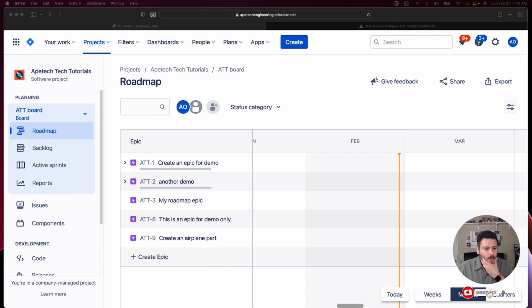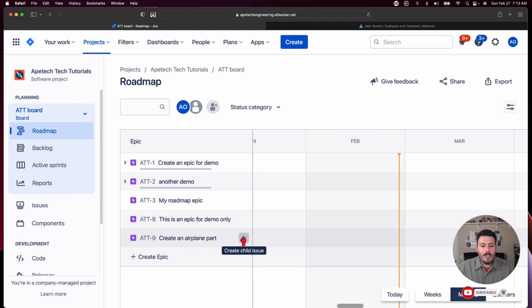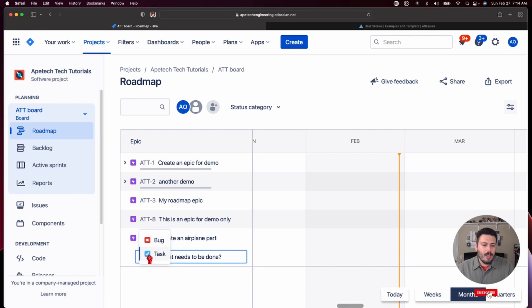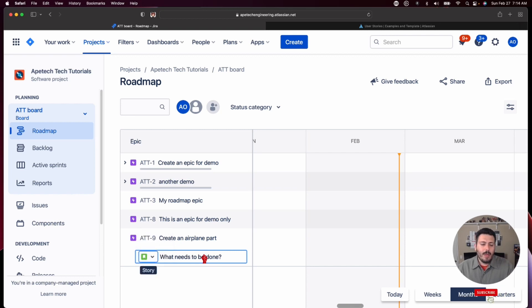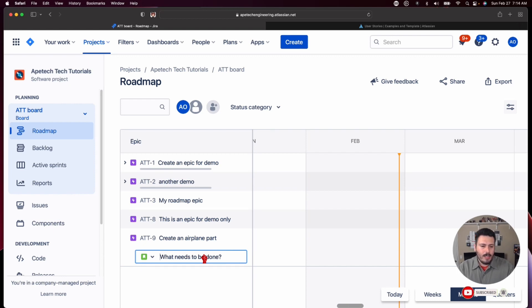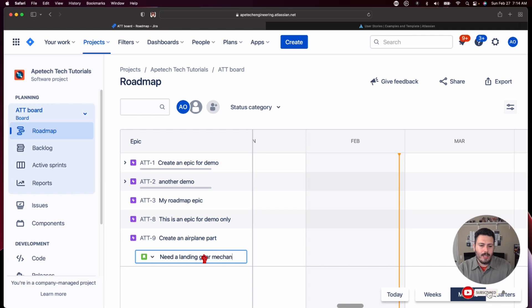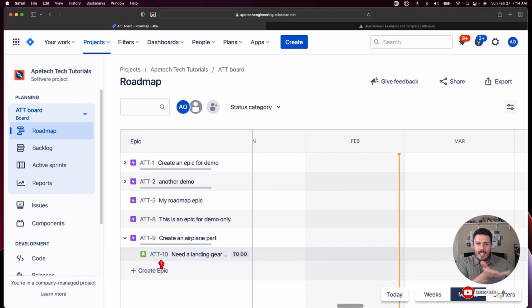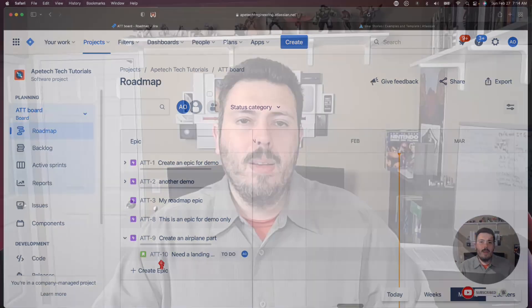So in this view, you're going to want to go to the epic, specifically in the roadmap and there's a little plus sign. So if you click on that plus sign, you'll see create child issue of. So if I click on that, it automatically defaults you back down to a story and you can click on this and this is how you would differentiate between am I creating a story, a task or a bug. Pick the one you want and I'm going to create an airplane part and I'm going to say need a landing gear mechanism and that's it. You'll notice that the story is nested underneath the epic, which is really key. This tells you that the epic now has a child and that child now has a parent relationship back up to that epic.